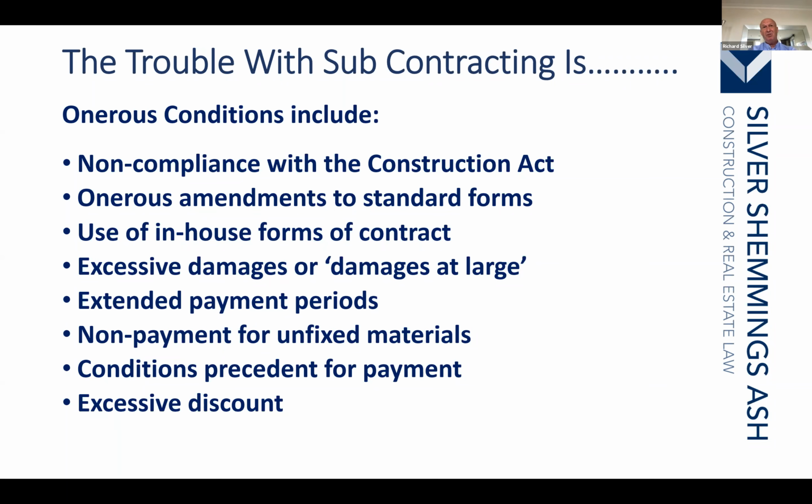And that can hugely change the whole nature of the subcontract. Most disputes all centre around whether payment and payless notices have been issued in due time. So do check your construction contracts, subcontracts, to see if they comply with the Construction Act.